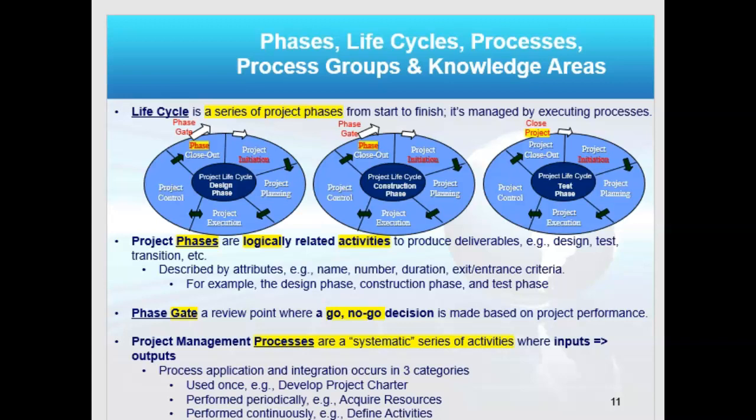Now, we've already discussed life cycles in the process group, so this is really just a review. Remember, a life cycle is a series of phases, right? Like design, construction, testing, or before we've said design, testing, and transition, whatever phases you need. This is why project management ties into any industry, medical, car construction, environmental, because you can take your own industry life cycle and use project management, because in each phase you will do IPEC and end with a phase gate, which is that go, no-go decision. Then you'll go on to the next phase if the decision was go.